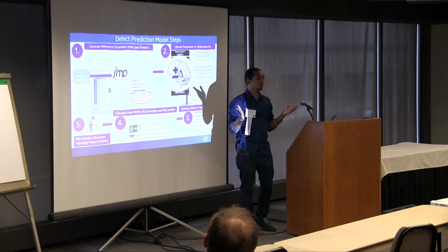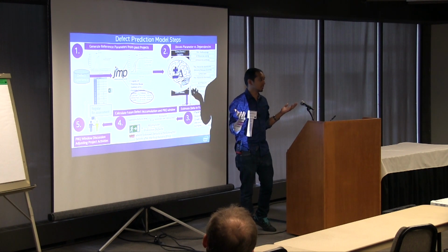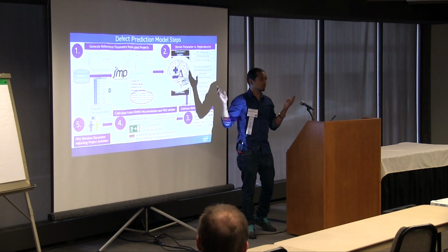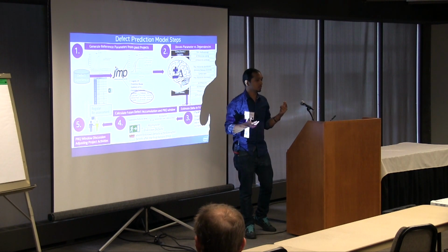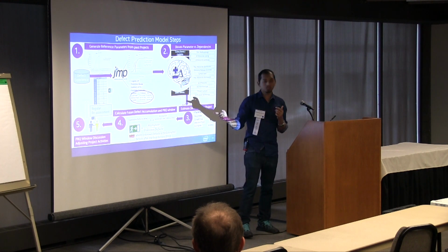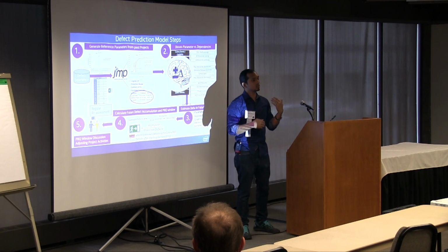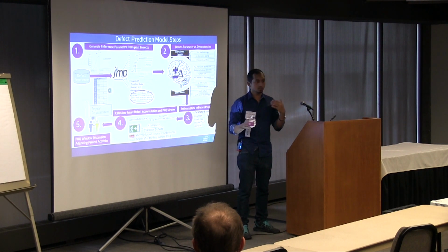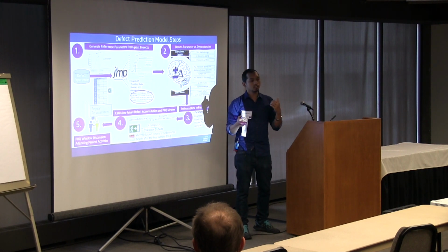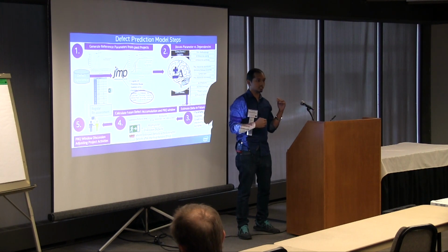When you plot it, you will see, hey, no, this is not something I want. I'm going to see so-and-so X amount of defects after that. So what should I do about that? Which leads us to step 5, where you have discussions with your program managers, project managers, and all the architects, and say, hey, if you do that, we are going to see these many issues.